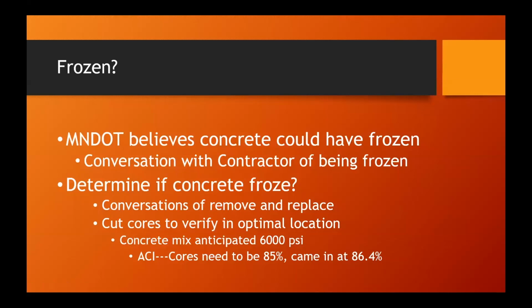So MnDOT believes the concrete could have frozen. Inspector has the conversations with the contractor of concrete being placed on snow or ice. But then how do we determine if the concrete is frozen? Conversations were had between the contractor and the department of remove and replace. But that costs time and money, and who's going to pay for it? Agreed upon to cut cores to verify concrete strengths in place.